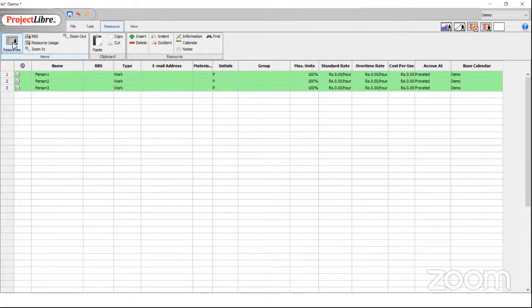Now, in our case, life works very differently because we are doing a wide variety of activities. We are following up with vendors. We are placing purchase orders. Then a vendor is giving a delivery. Another vendor is giving a delivery. There's a lead time involved in that part coming in, and that lead time of 40 days goes in here as time. Then if you put a resource there, it doesn't mean that you as a resource are engaged for 40 days. Whereas in the case of the software, write segment one, 17 hours, that resource is fully utilized for the 17 hours. He can't do anything else.